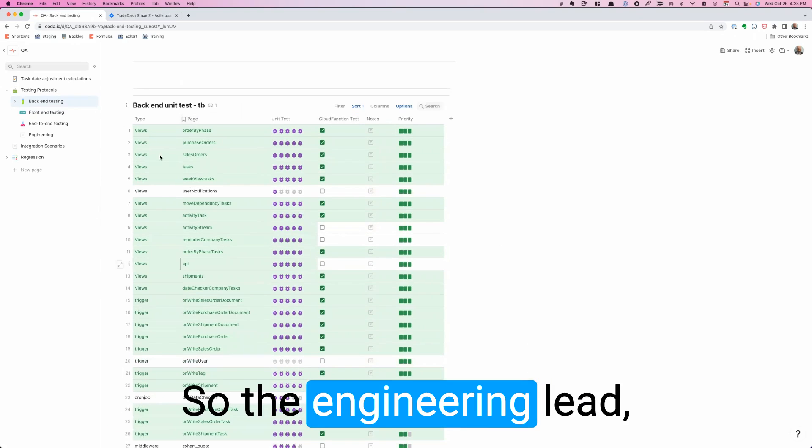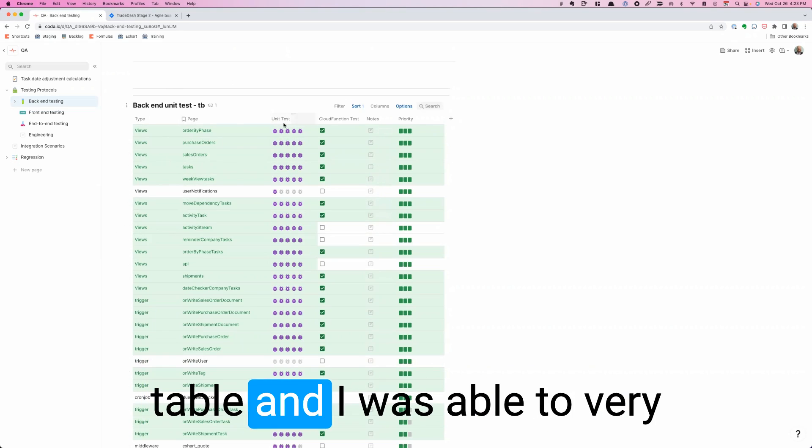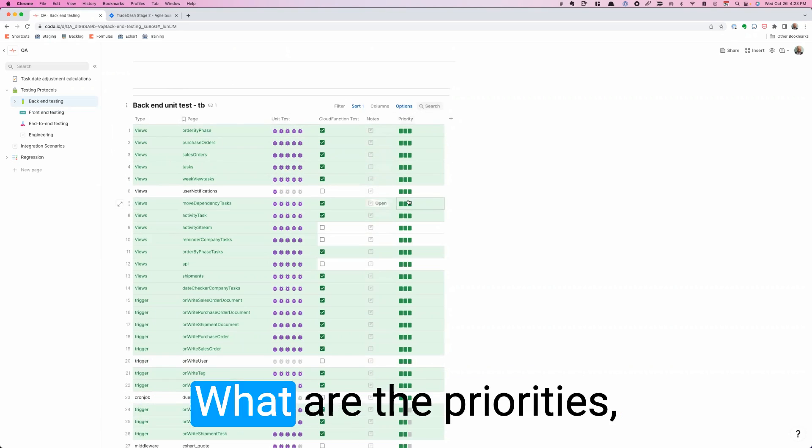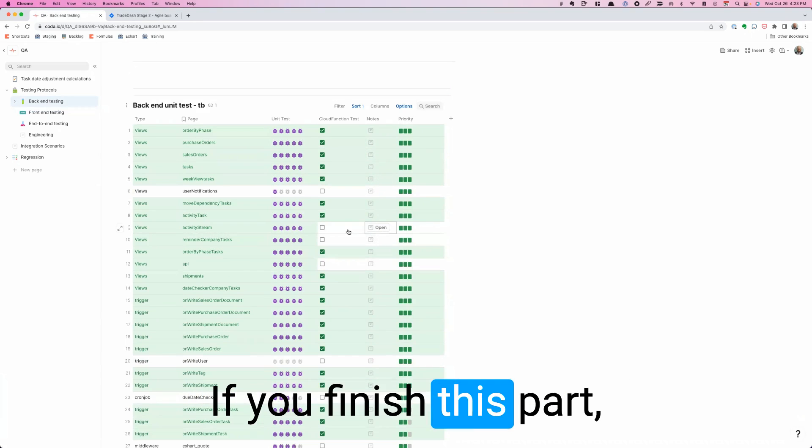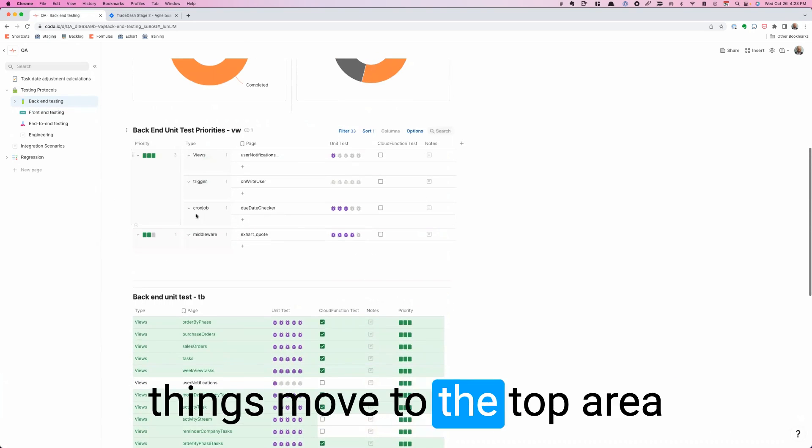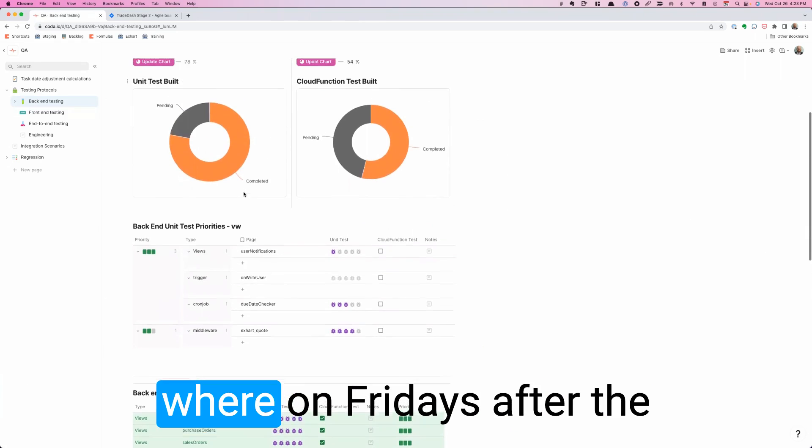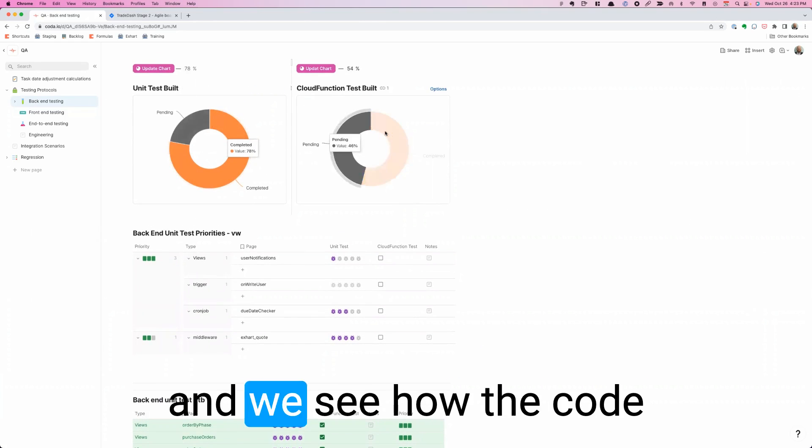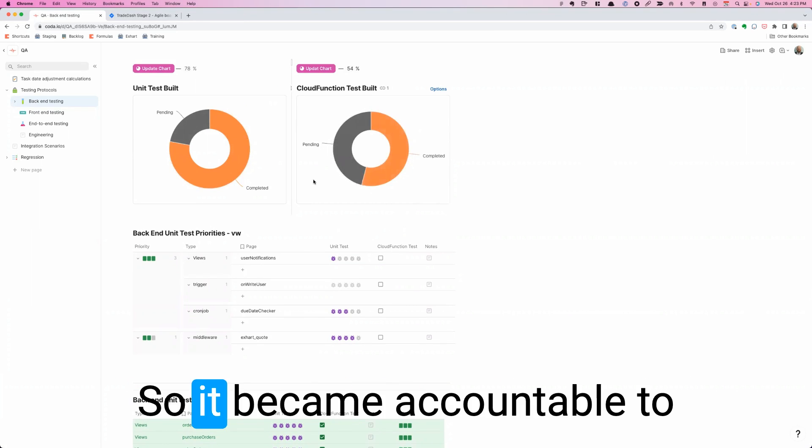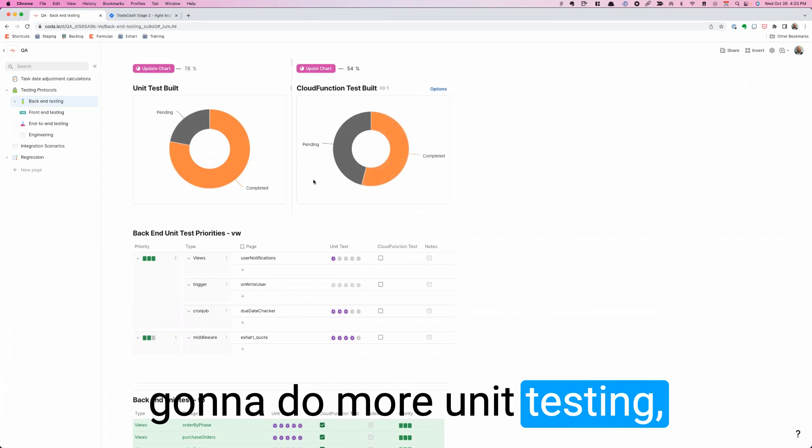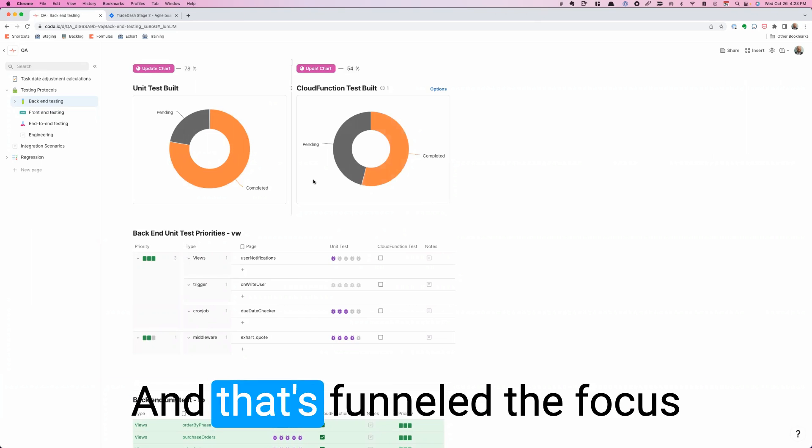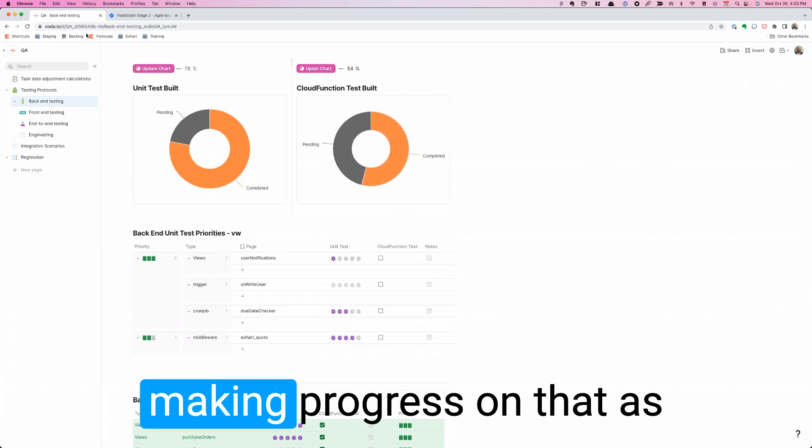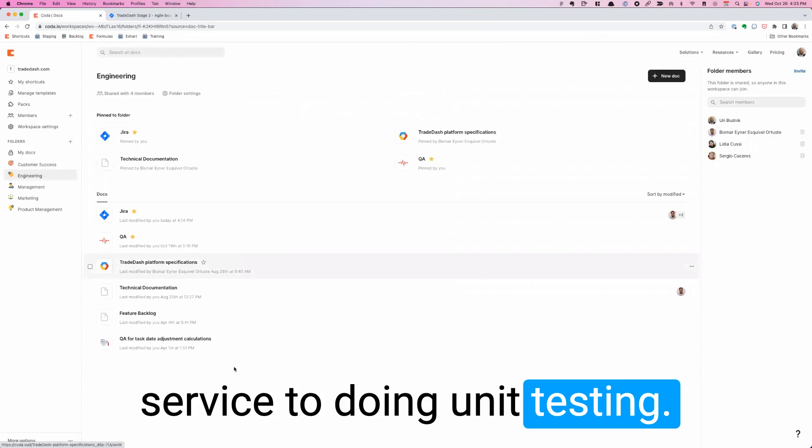And I was able to very quickly set some tracking here. What are the priorities? What is the progress? Conditional formatting is what you see here. If you finish this part, you finish that part. And then based on priorities, things move to the top area that we're paying attention to. And we now have a ritual where on Fridays after the sprint demo, we update this and we see how the code coverage on the unit testing is increasing. So it became accountable to all of us, not just saying we're going to do more unit testing, but we were able to quickly create a document to track that. And that's funneled the focus into making sure that we're making progress on that, as opposed to just paying lip service to doing unit testing.